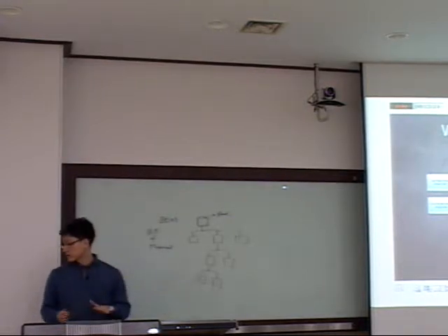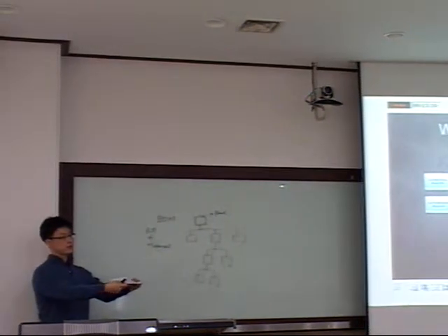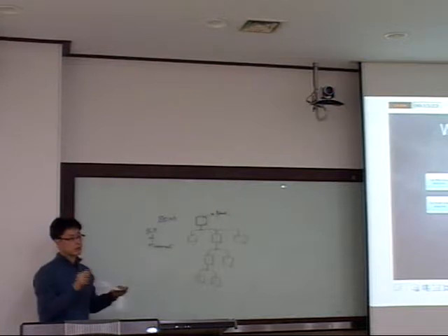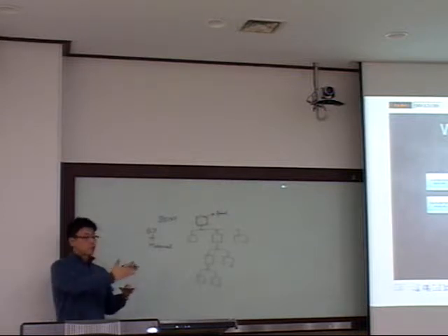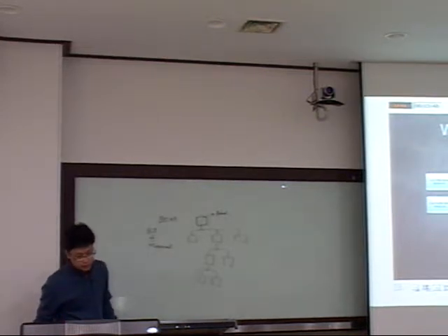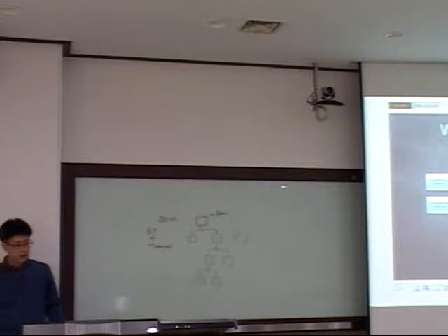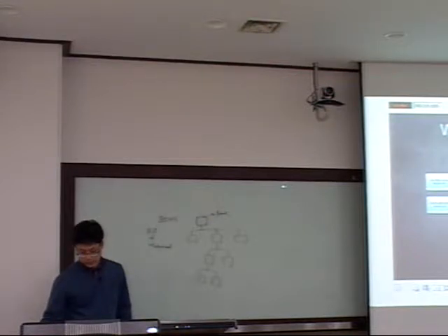Shape plate part means from a flat plate, you have to bend it like that. That is a shape. Shape is a verb. And if you want to put the stiffeners on top of it, you have to also bend the stiffeners, right? Right? So shape profile part here. Cut plate part, you have to cut before you shape it. Cut profile part, you have to cut it before you shape it. So this is the simple example of work breakdown structure.